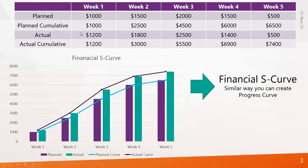Now we see what happened when the project is executed. Instead of spending $1,000 in the first week you spend $1,200, and in week two instead of spending $1,500 you spend $1,800. When it comes to the cumulative, you can see you have spent $7,400 on the fifth week instead of $6,500. That's a pretty big difference comparing to what you have planned.